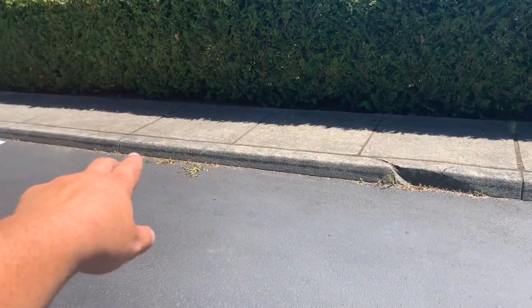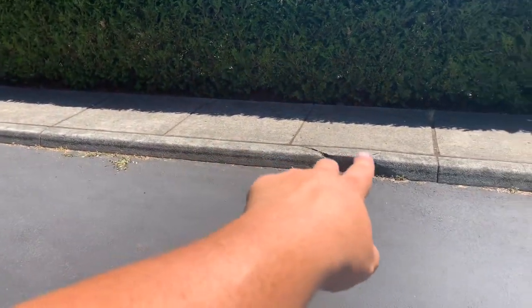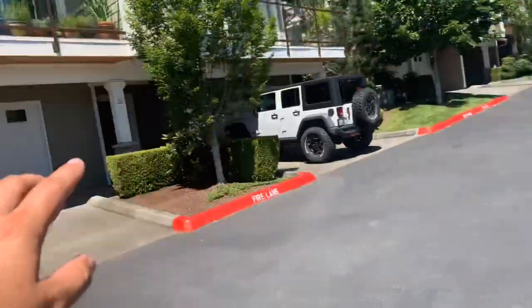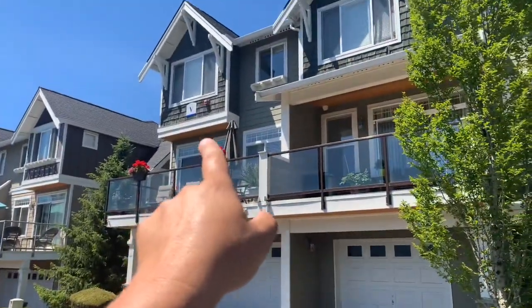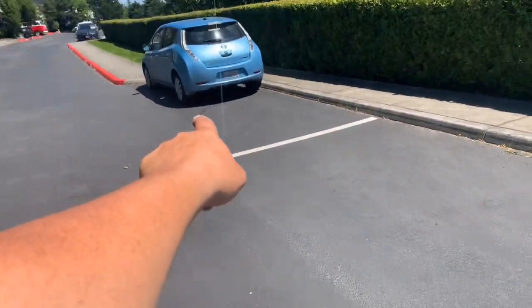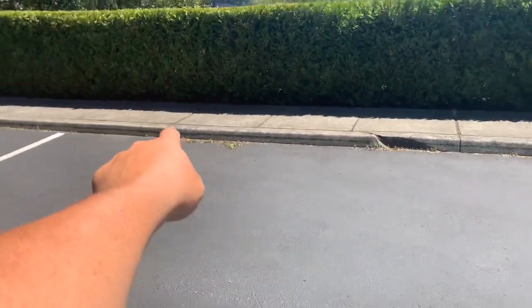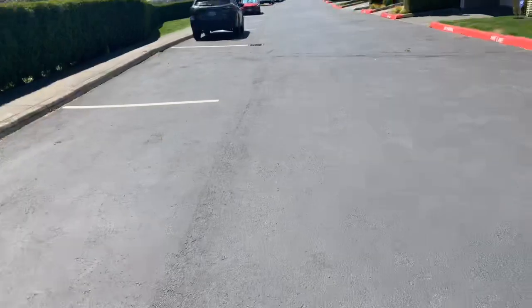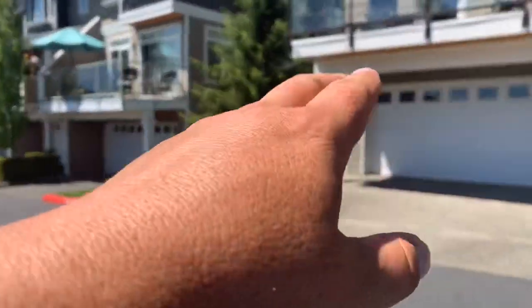All right, so we've got almost 12 feet here of curb. This is out in front of V, okay? It says it up on the building. We've got not the first stall, but the second parallel stall. We'll go from that joint to that joint, and we're going to take that out and replace it. Okay, it's 12 feet.